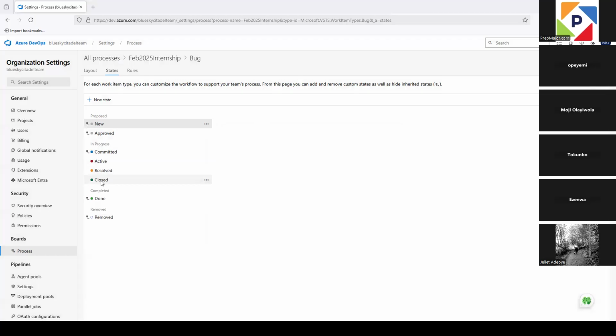But it helps our team, because we understand what each color means. It helps our team to know what is going on. So we know that once it's closed, then it goes to the completed column. So when I'm seeing a bug that is closed in QA done, I'm asking the person that has their name on it, oh, sorry, that bug has been closed. Are we taking it to done? It might be because they finished it, but they're jumping on something else and have forgotten to take it to the completed column. So you're just checking, because you understand with your team that close means there was a bug raised, it has been fixed by the developer, it has been retested, it has passed testing, and it has been closed.